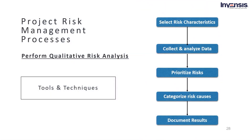On the other hand, the tools and techniques that assess individual risks will focus on identifying those that will directly have a huge negative impact on the project. To begin with, you have to select risk characteristics that define risk importance. These tools provide a way to recognize risks that are important for analysis from those that are less important. Output from such tools can be a listing of risks according to their priority order.